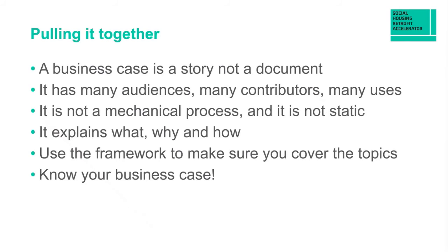And the key thing to remember is it's not possible to just sit down and write the business case. There will be things that emerge. There will be things that are incompatible. You'll have a set of objectives, a set of outcomes you're looking for, a set of benefits, a set of plans, and then you find that the costs don't work. So you need to rethink. So there is a continuous reevaluation of the different parts of the plan to make sure that you can actually deliver it. And so you must come to know your business case very thoroughly. You will be using it constantly throughout the project.